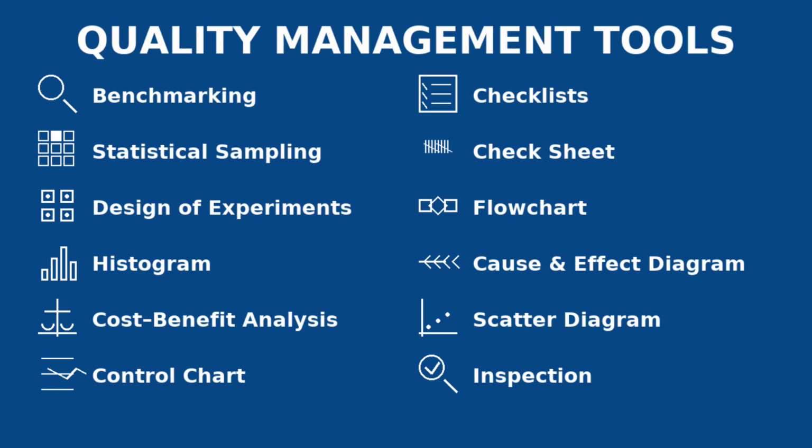The next project manager is collecting data points to look at the relationship pattern, or whether any correlation exists between two variables. He is using a tool called scatter diagram. Scatter diagram is going to plot the relationship between two variables to check for correlation and predict quality trends.